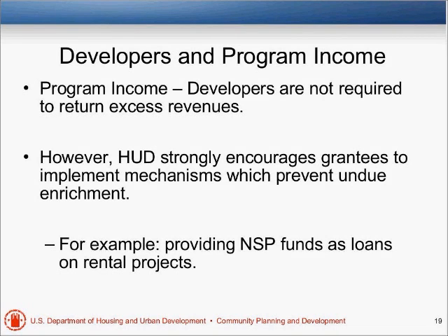Well, this is John. I think the requirements are different. So they're either a developer or a subrecipient, but you're kind of trying to make them both, and I think it would result in confusion over which. There are some key differences that Stan will go into, but let's just pick procurement as one of them. If you've got a subrecipient, they have to follow the same kind of public procurement rules that you do.